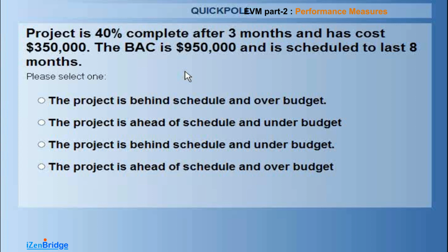Good. So you zero in on two options, then you look at the cost performance index, and if you find that the cost performance index is also doing good, if it is also more than 1, then it's a happy state. You are ahead of schedule and your cost is well managed. That's it.